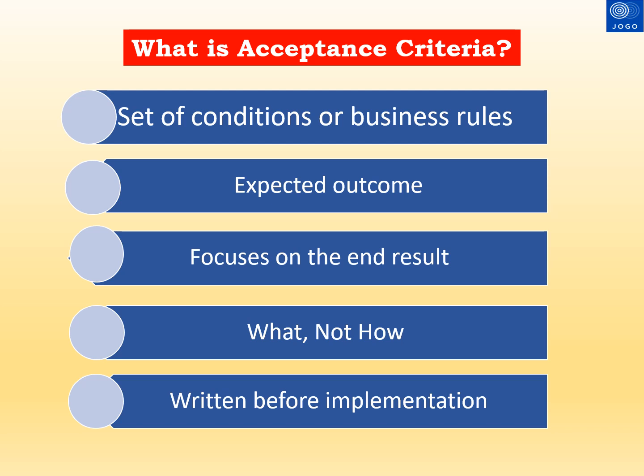Acceptance criteria clarifies the expected outcome of the user story in a concrete manner. It focuses on the end result — what is needed for the customer — and is not related to how the solution should be implemented. Acceptance criteria should be written before the implementation and can be created jointly by the development team and the product owner.